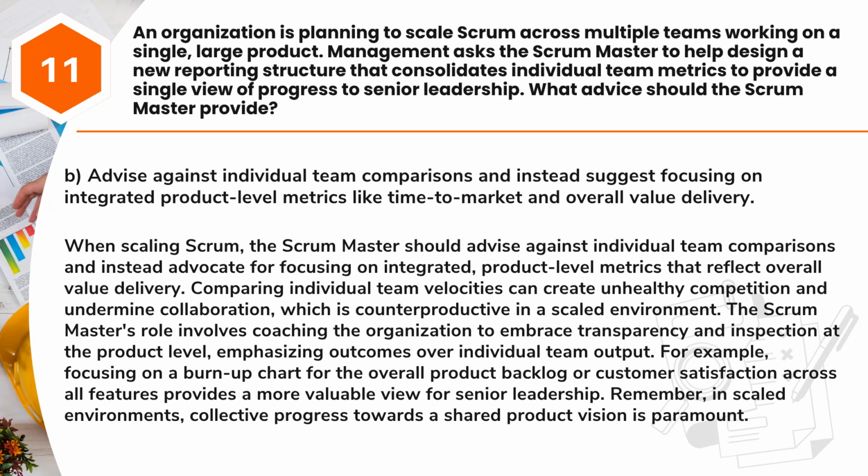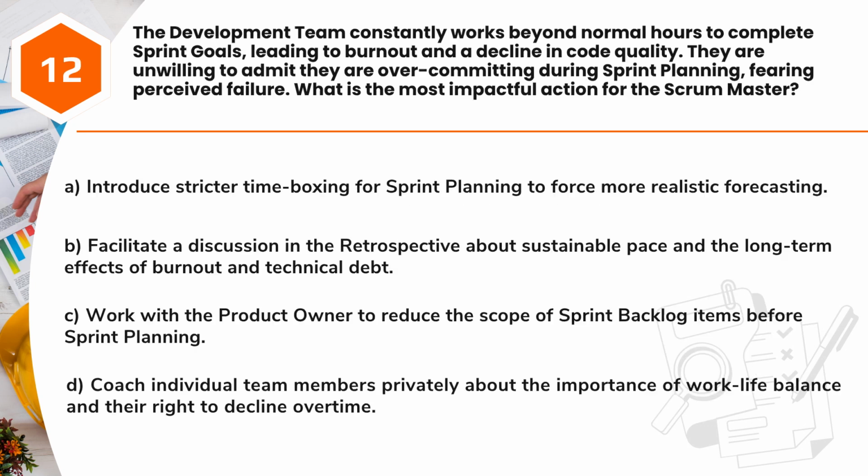The Scrum Master's role involves coaching the organization to embrace transparency and inspection at the product level, emphasizing outcomes over individual team output. For example, focusing on a burn-up chart for the overall product backlog or customer satisfaction across all features provides a more valuable view for senior leadership. Remember, in scaled environments, collective progress towards a shared product vision is paramount.